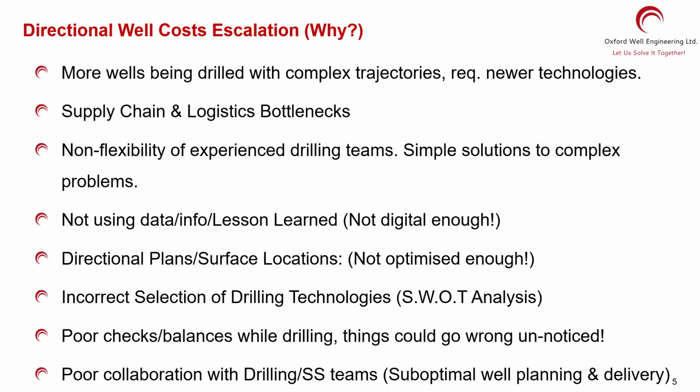So poor collaboration. A lot of the time, the drilling people do not talk to the subsurface team properly. Subsurface team do not talk to the drilling team. I was told that some of the operators in some countries have them in separate floors so that they do not talk to each other. The result is suboptimal well planning, and the delivery of the well is a little bit crooked. This is something that I did not see in big operators' offices, but we still have this culture of separating them and not letting them collaborate. Because when they collaborate, they will get the trajectory right.